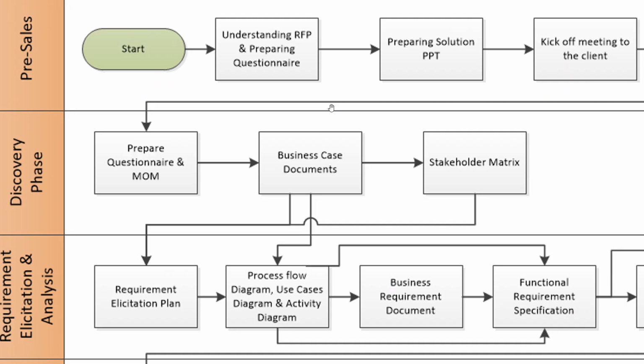The discovery phase, which I also call the requirement gathering phase. You need to prepare all the questionnaires, based on the understanding that you gained during the client kickoff meeting. Using the questionnaire, interviews, surveys, and all those kinds of techniques, you actually get a signed MOM from them. Whatever questions you have asked in that questionnaire, you need to get it signed.